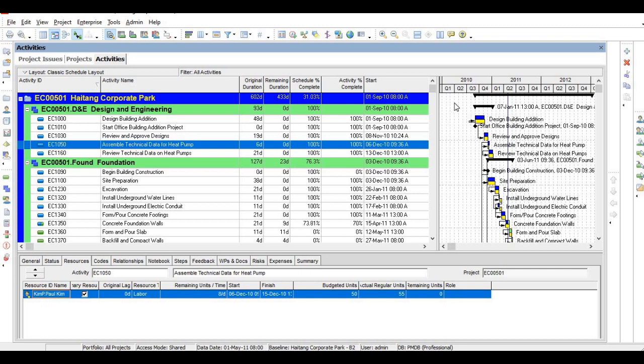If you want to do scheduling, you should know what activities you are going to do from start to end of the project, the duration for each activity, and the sequence by which the activities will be carried out from start to end. If you know the details only, you can do the planning and scheduling using Primavera. So you'll get the project start date, end date, and total duration of the project.